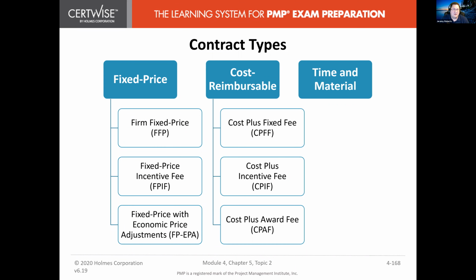They can put that in there because that will essentially protect the owner of that property that you're leasing from their property losing value over time, because the dollar actually loses value every year. So they can kind of fight that by having these economic price adjustments.